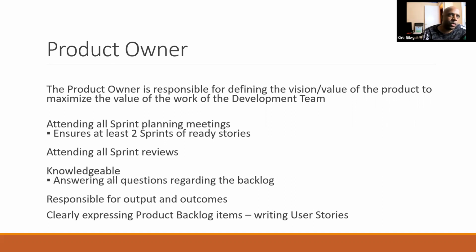And what we normally do, depending on how much work we have, is either address that bug in our current iteration, or maybe we plan for it in another release. And then there's another type of bug. Prior to production, for example, right now we work in UAT, right? If there's any bug related to UAT, then my team would have to fix it before it gets into production.